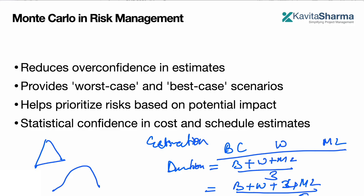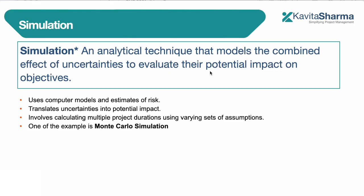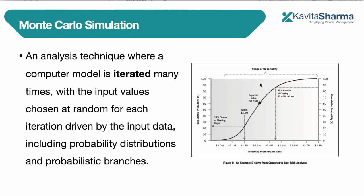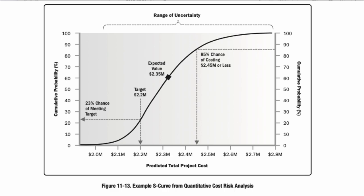Monte Carlo analysis goes further than that. You write down the best case, worst case, and most likely data, and the software works with that data. The Monte Carlo algorithm does permutation and combination of worst case and best case thousands of times to give you an outcome. A computer model is iterated many times with the input values, running many probability distributions and probability branches, and you get a result.